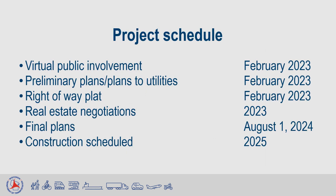The remaining project schedule is shown on this slide. The virtual public involvement period will remain open until March 10th. Preliminary plans will be sent to utilities in February to start designing any necessary utility relocations. The right-of-way plot will be completed in February and real estate negotiations will start this year. Final plans are due August 1st of 2024, and construction is currently scheduled for 2025.